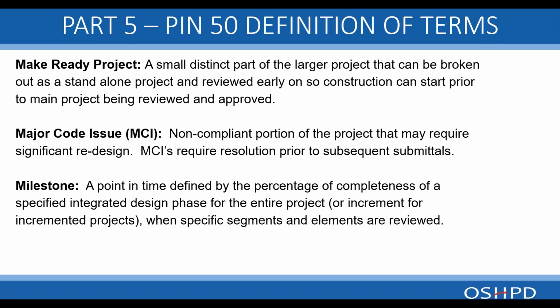A make-ready project is an important thing to know. It is a small, distinct part of the larger project that can be broken out as a standalone project and reviewed early on so construction can start prior to main project being reviewed and approved. This is a very valuable tool to get the project going and should be considered on large projects.